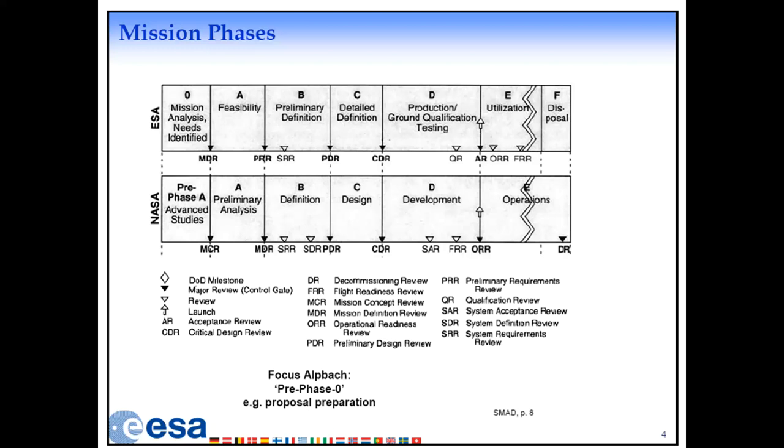Without a white paper, you can't really attract ESA or be a real party asking to be a client or supported by ESA, to have ESA guide you through the primary mission analysis. This is a gray area, but a white paper should be in hand at the beginning: what you generally want to achieve with a mission and what it would generally be sized to. And then you advance further. But at that time, others have white papers too, for this half cornerstone mission of this and that. And then you will compete for a feasibility study to be funded already by such an agency or even a local domestic agency or a consortium of such.